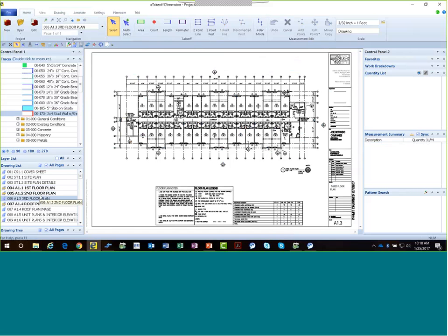and you'll find that in some projects. You know, you get into a multi-level office building, maybe the core area is the same for each level. And some systems will say just take off one and then do a multiplier times the number of floors. Well, then I don't get the detail that I would like to have. I just get a summation of that. But I'd like to have the detail. So I would like to have the same detail on floor 3 as I do on floor 2. So let's go back to floor 2.